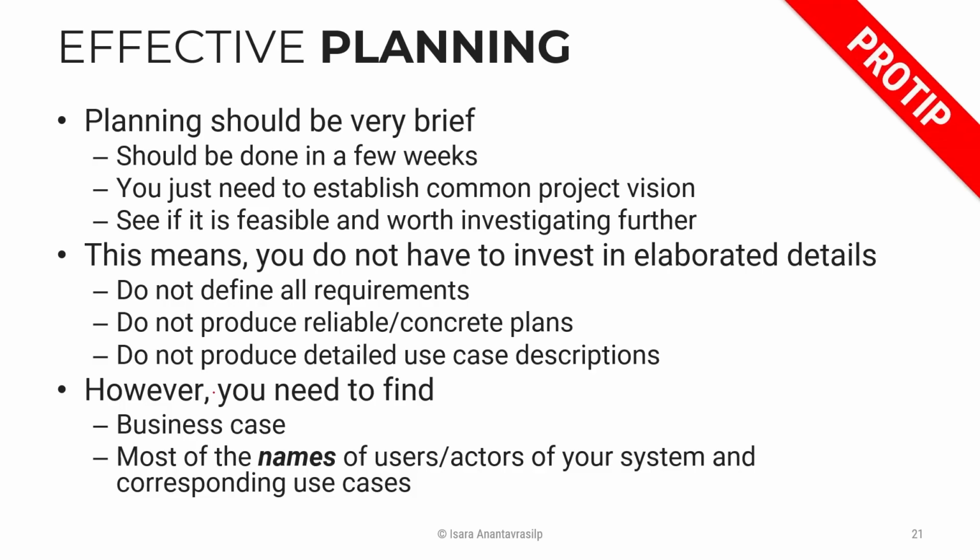Pro tip for you: effective planning. In this planning or inception phase, it should be very, very brief and short. It should be done in just a few weeks. You just need to establish a common project vision, see if it is feasible and worth investigating further. You set your budget, you set your time, and you see whether these features benefit everybody, benefit you mostly, and all your stakeholders or not.